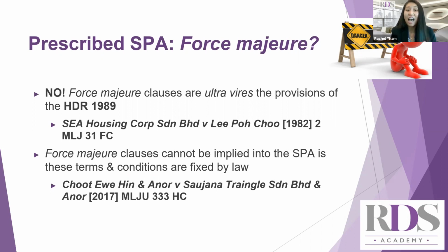In fact, had the developer attempted to persuade the controller for an extension of time, he would have escaped the liability. But the developer made no attempt to do so. Thus, the court would not allow the developer to take advantage of such a clause to delay the delivery of the vacant possession at their own discretion.